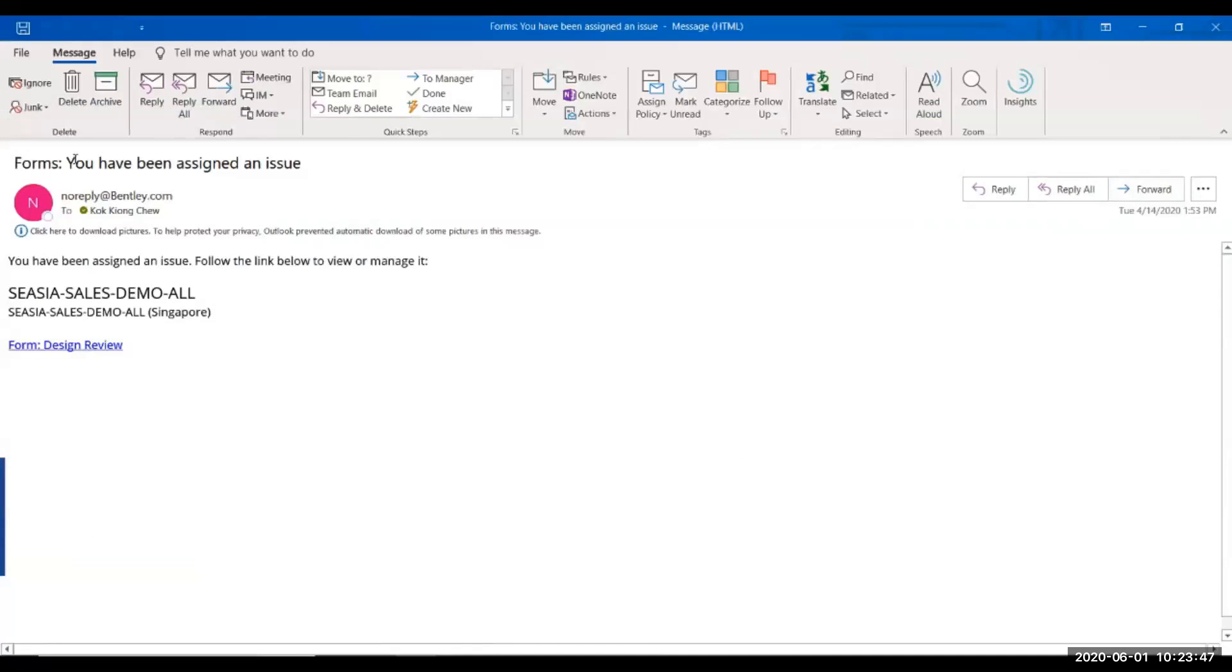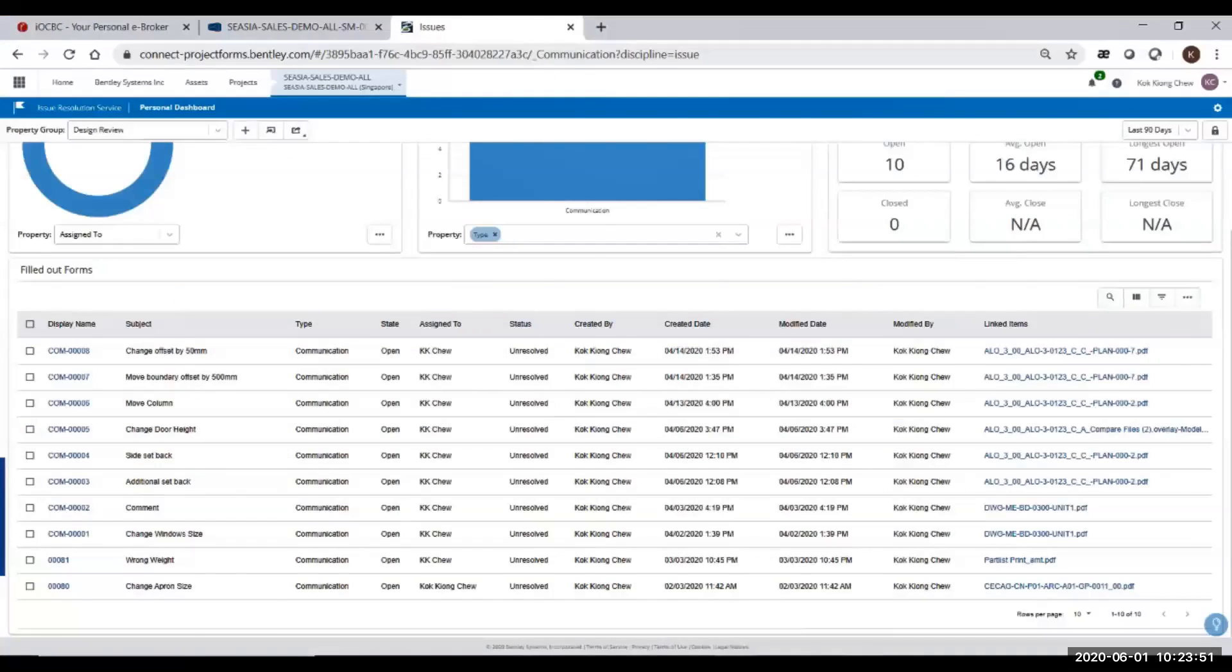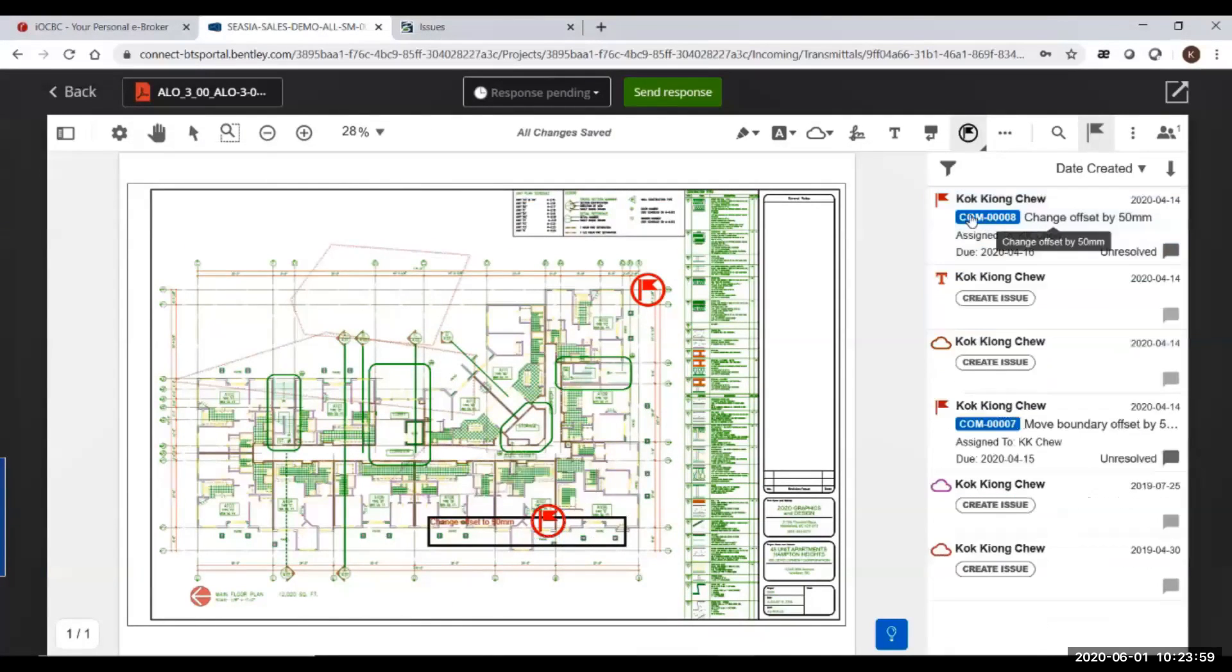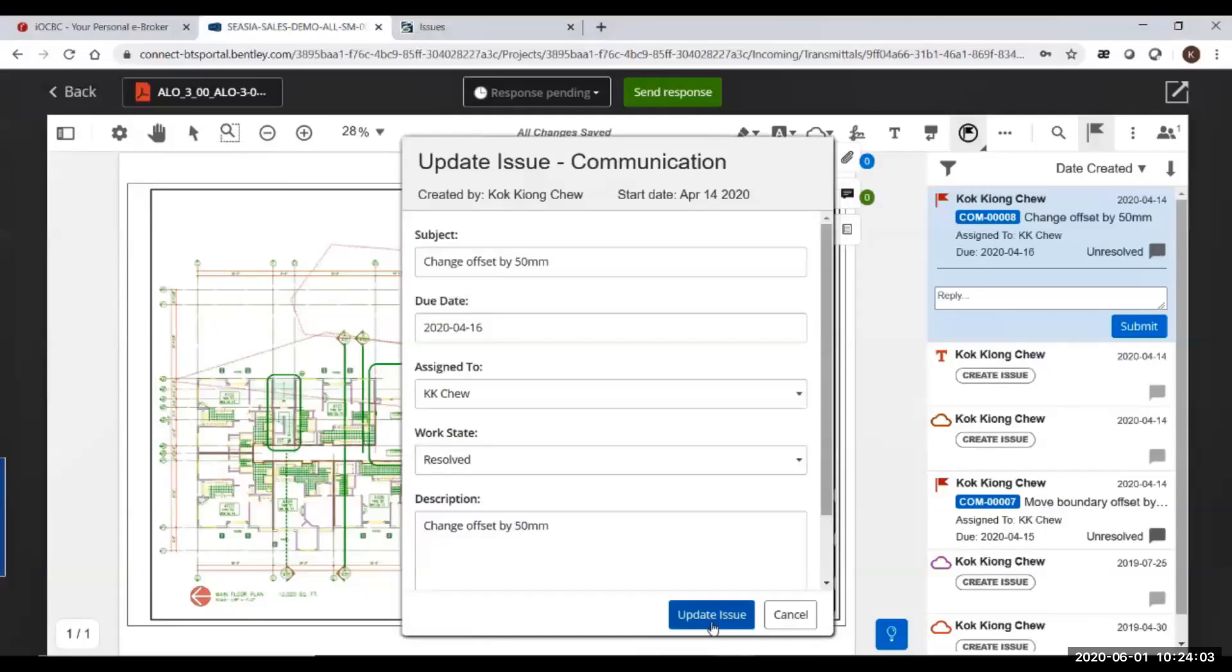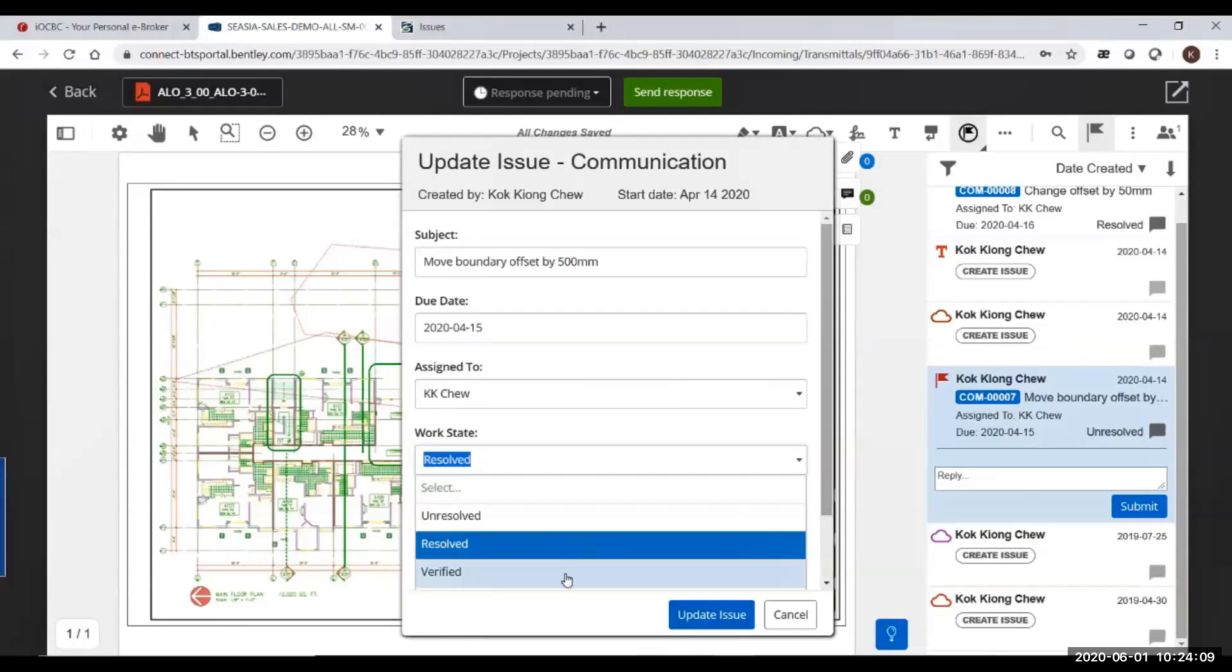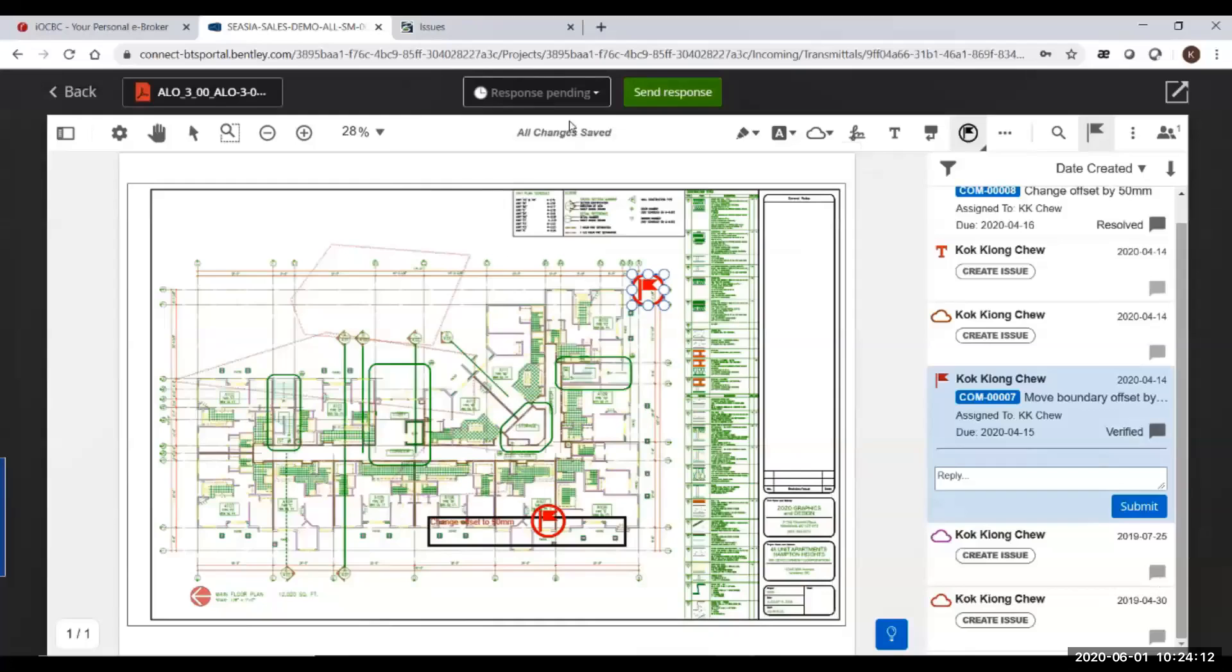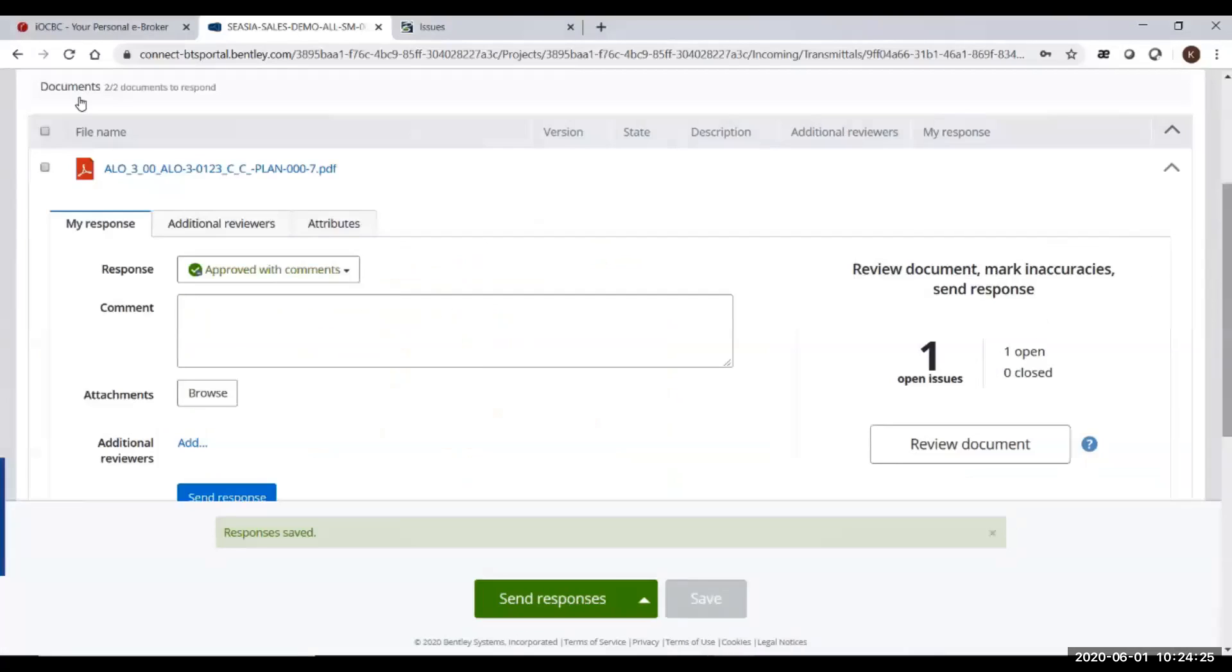By clicking on the link on the right-hand side of the table here, you will go back to the same screen. You no need to go and find which drawings. You can actually put your comment and reply on this particular issue. Once you have done that, you put resolve. Let's say I'm the owner of this. I can put resolve and then update the issue. Once updated, you will send out email notification again. After you have done all, you can put a final comment on this drawing, say approve with comments. Then I go back here.